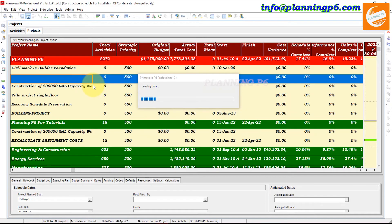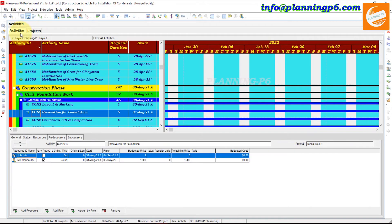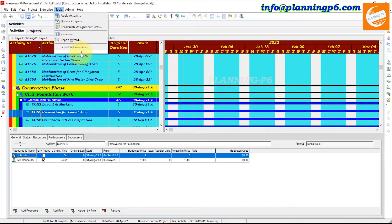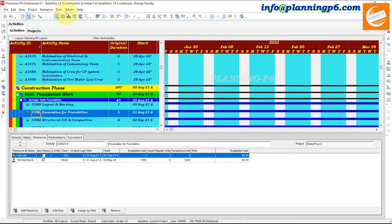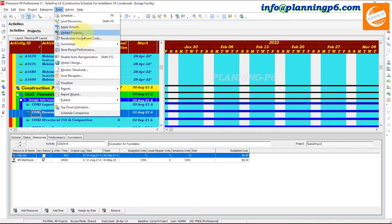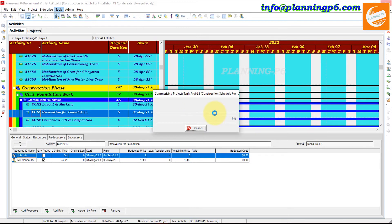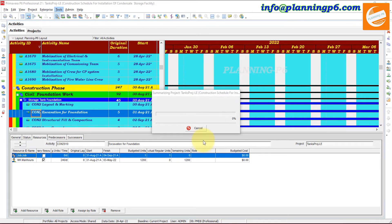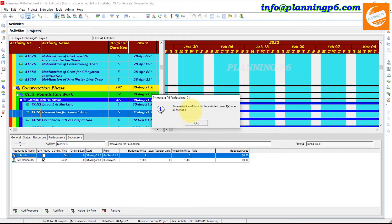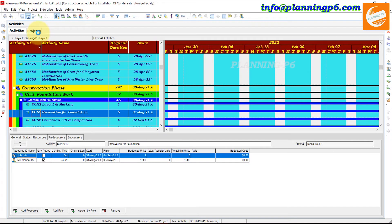There are two or three ways to summarize projects. Go to Tools — in the Tools menu you can see Summarize. You have options for All Projects or Open Projects. If you want to do it for all projects you can, but it will take time. We will do it for Open Projects. The summarization is running — the project data is being processed. Summarization of data for the selected project was successful.